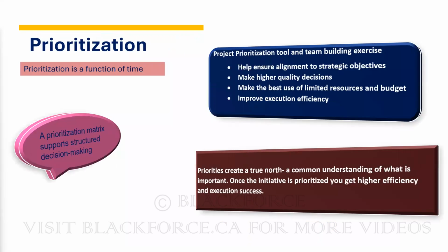We talked about prioritization. Why do we need to prioritize? Because some projects cannot be implemented until some other ones are implemented. There is a dependency, right? So if you want us to implement Salesforce, how can we implement Salesforce if we don't have any cloud infrastructure, right? So we need to first move some of our applications to the cloud, or we need to move some of the infrastructure to the cloud so that we can have software as a service, right? So these are some of the dependency projects that you need to prioritize.